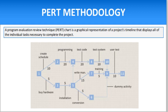A project manager creates a PERT chart in order to analyze all of a project's tasks while estimating the amount of time required to complete each one. Using this information, the project manager can estimate the minimum amount of time required to complete the entire project. This information also helps the manager develop a project budget and determine the resources necessary to accomplish the project.